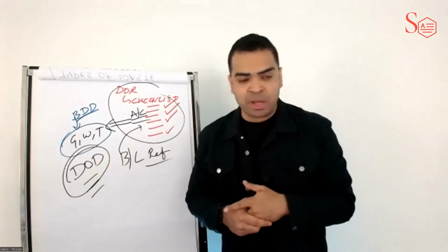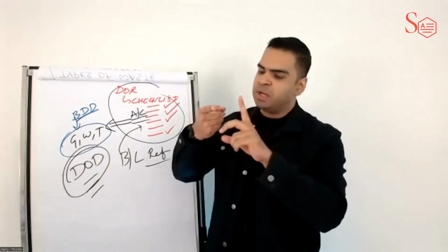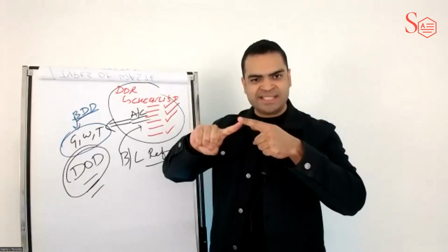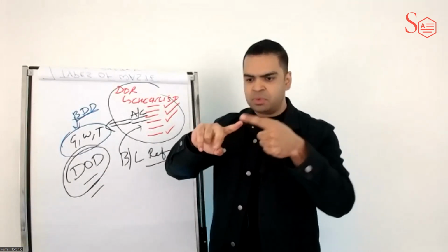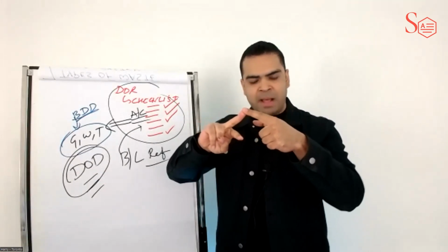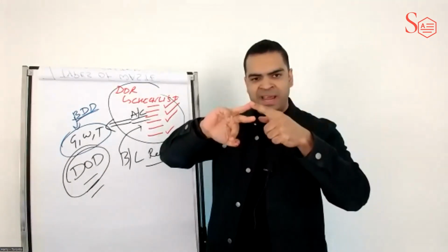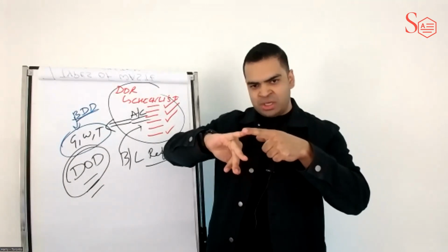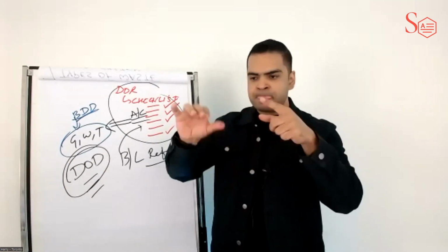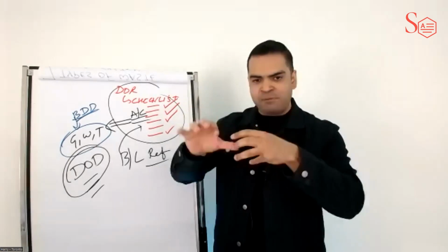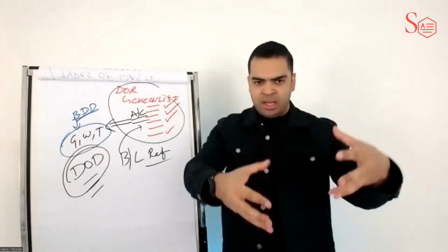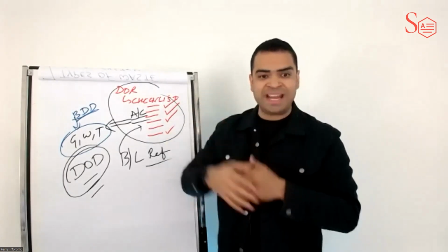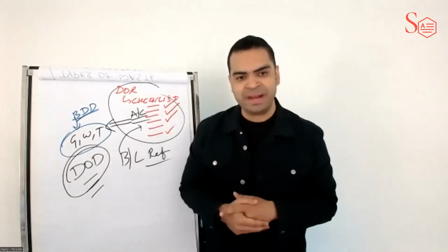For example, a team could have a definition of done for a sprint. Every time we complete a sprint, we're going to have these things checked off. All stories have passed our acceptance tests. All stories have been accepted by our product owner. Code has been checked into version control. Relevant documentation has been updated. All recurring tests have been stored under version control in this repository, and so on. So that is a definition of done for a sprint that a team could agree on.